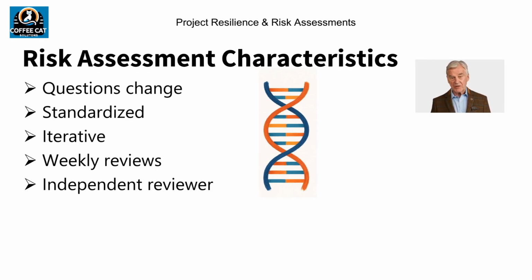Risk assessments provide a more dynamic, detailed, and real-time understanding of a project's risk profile than risk and issue logs. But before looking at how to perform a rapid risk assessment, let's look at some characteristics to consider. Risk assessment questions change with the type of project. For example, COTS business implementations, data warehouse projects, infrastructure projects, and AI projects ask different risk questions. To perform risk management effectively, you need to implement a risk management framework for risk analysis, response consistency, and repeatability within a project and across projects.